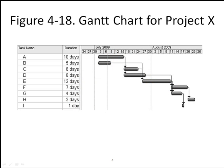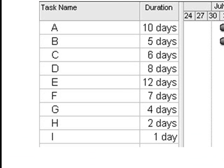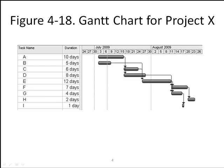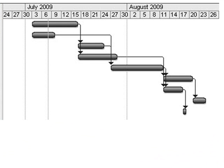One of the ways to look at work over time is with a Gantt chart. This one was produced with Microsoft Project. One of the main uses of this type of project management software is that you can enter data just one time and use it many different ways. As you can see, there are nine tasks involved in this project, listed as A through I, with each task having a duration in days. All you need to do is list the starting point for each task and the chart produced shows you graphically all of the work over time for the project.